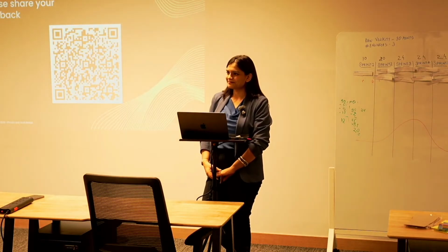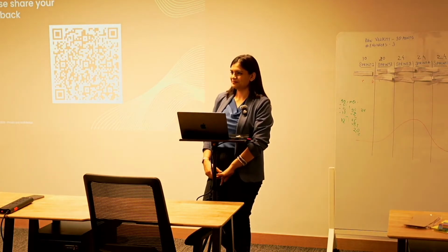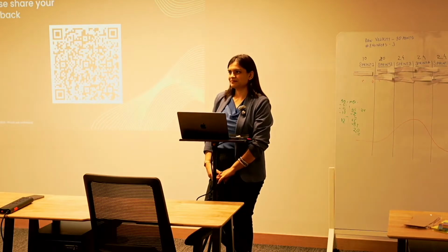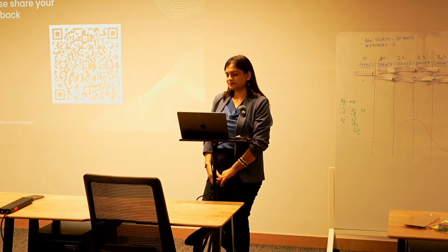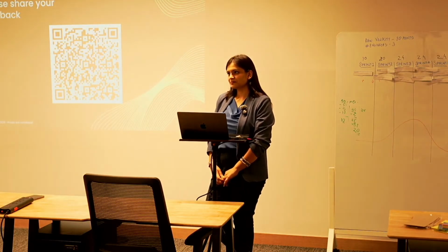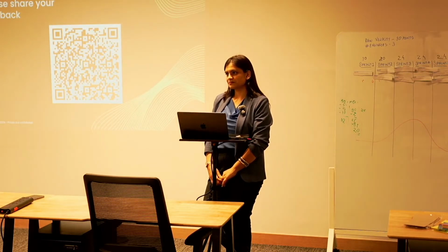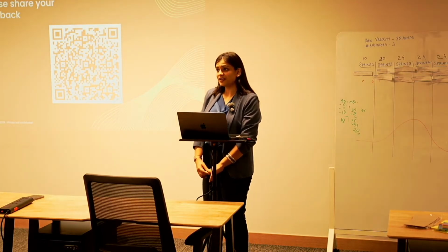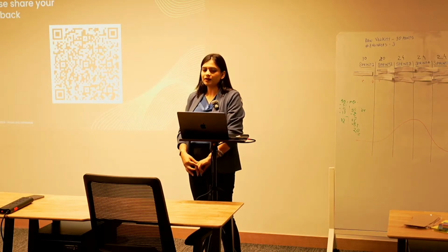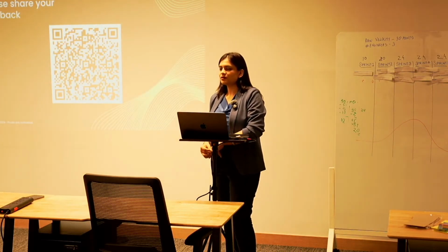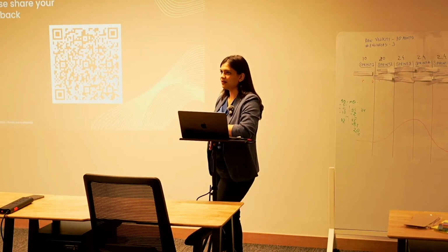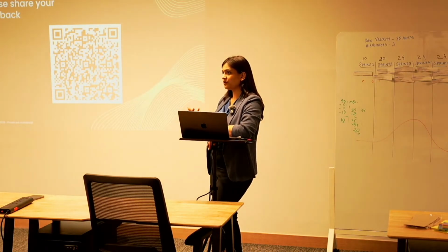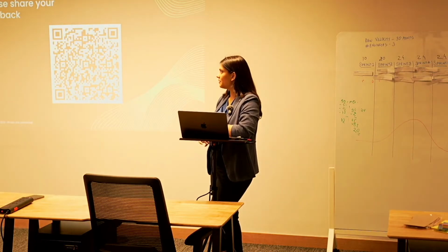Every year across all the banking applications, across each and every banking member, we get the calendar from January to December. In this month we are going to have the DR activity, and in this month we are planning for holiday month. Like code freeze, yes, things like that. A lot of banks do that. They also have points when they don't allow you to deploy anything. So you need to take those factors into consideration. That's a great call out.